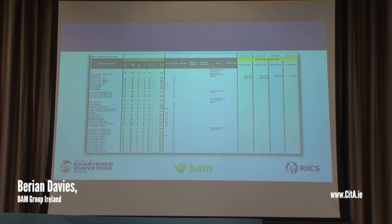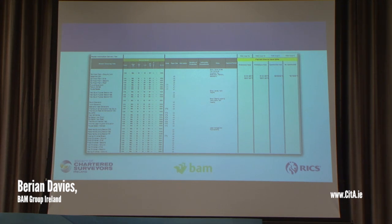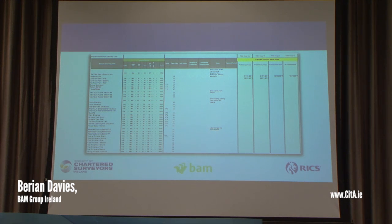How this is relevant to the quantity surveyor: I'm letting people know that this plan exists. If you're a quantity surveyor starting on a project, ask for the MIDP. Find out if it exists, and if it does, make sure your deliverables are placed within this document so that everyone knows what you have to produce. Then as a design team or project team, we can hit the targets that we need to.